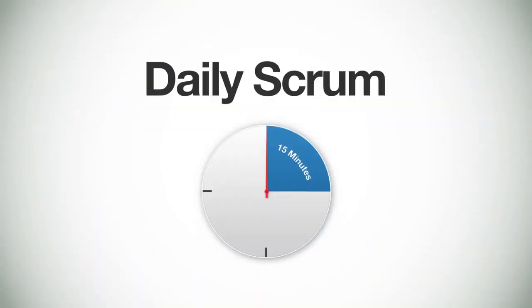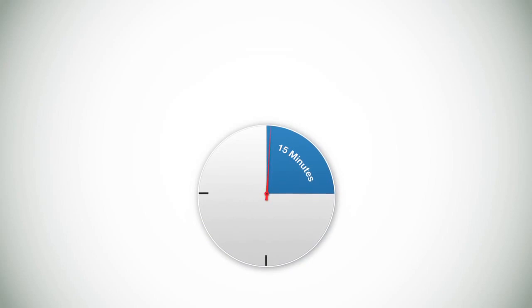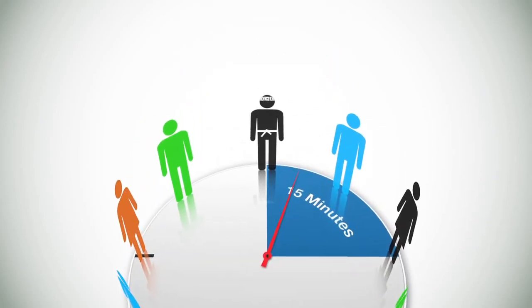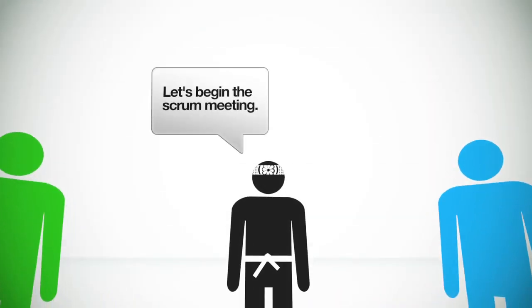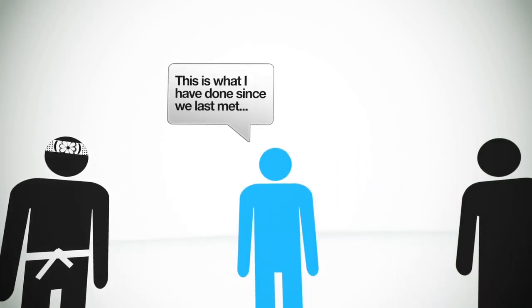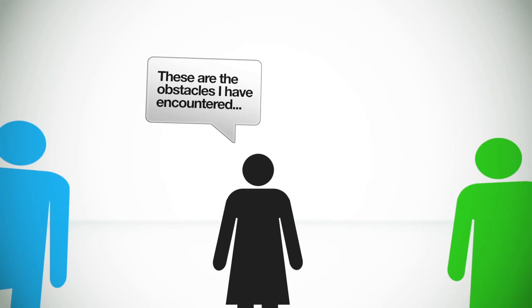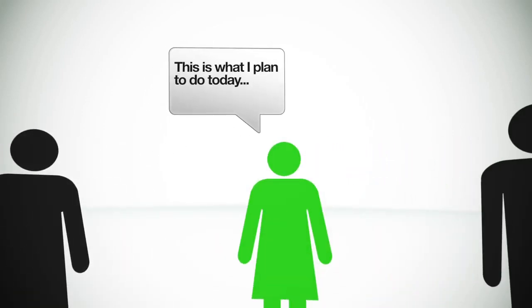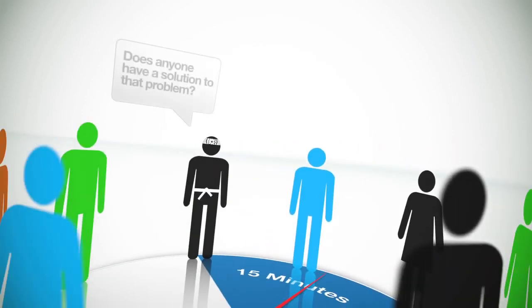And that brings us to this, the daily scrum. The daily scrum is an essential tool to having communication flow freely between team members. The idea is to have fast-paced, stand-up meetings where team members quickly list the work they have completed since the last meeting and any obstacles in their way. By meeting daily, it ensures the team is always in sync and any major issues are dealt with as soon